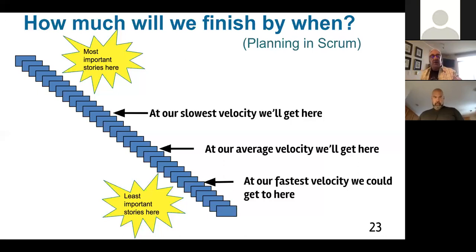But this is the picture that you have in your head when you're talking about planning formal releases outside of a team for general use. And it's this idea, with confidence intervals, you'll notice, that we will simply march down the product backlog at a predictable and measurable pace. At the end of every sprint, we will have working and tested software, and we can simply choose when the trade-off is right for us, the trade-off being time against scope.